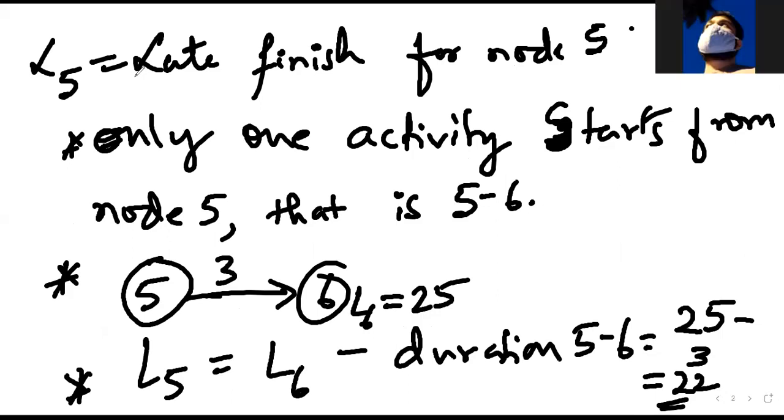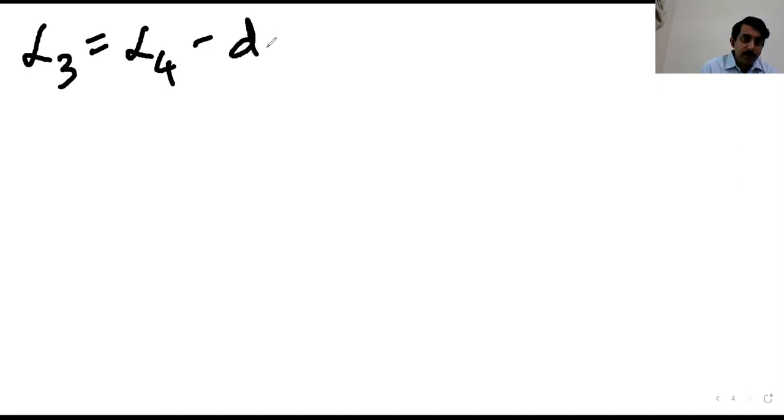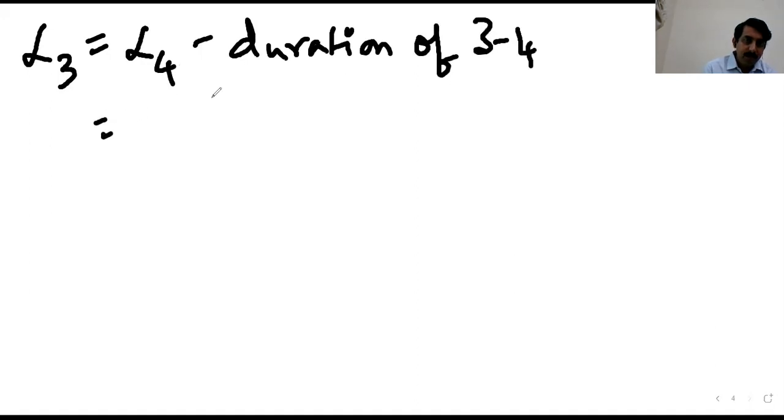Done, sir. Once this is done, next, L3. L4 minus duration of 3-4. Is it right? Correct? Yes, sir.